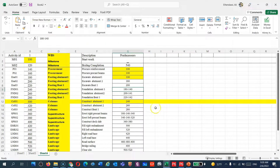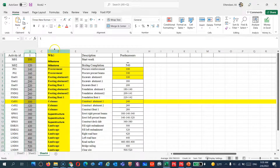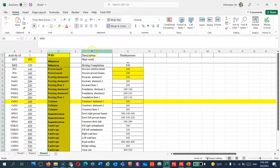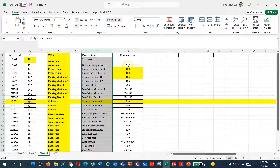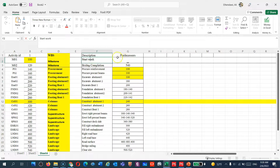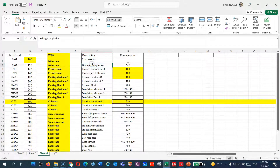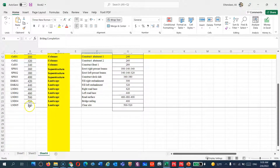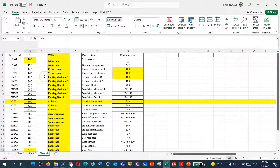Let's go to Excel and show what I did so you can follow along. Last lecture we created the activity ID, the WBS, activity descriptions, and then I created a predecessors column here to show you a sequence of work. By the way, 'Start Work' is a start milestone with no predecessor.